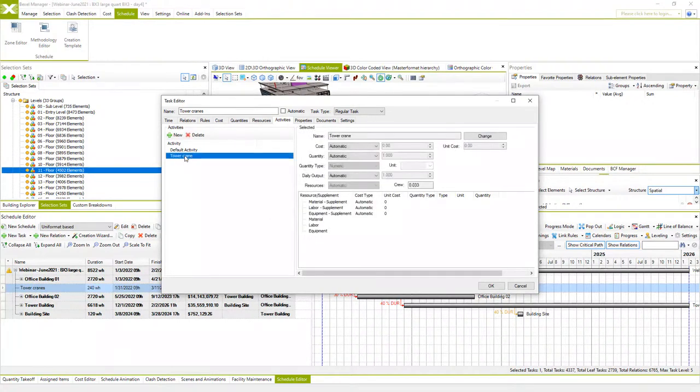And once we have a new activity, we can set its price and calculation method. If I set cost unit cost, and for quantity select time, the price will be time dependent. The price could also be fixed, but this could be more accurate for some activities. For mapping, I will set working days and unit price, for example, $1,000.